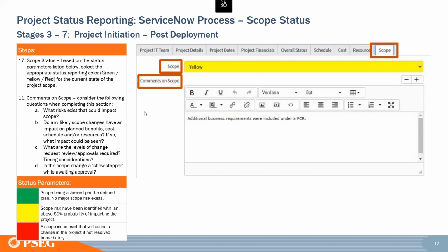And you're going to want to think about what are ways that I can maybe prevent that from becoming an issue. Is potentially a pilot an option, or getting something in front of them so they can visually see what it's going to look like? Or, if they generally can't commit to UAT, how do I identify backups for them and have conversations with the right level of leadership on their side? Or maybe contract resources that I can bring in a little bit earlier to mitigate that. May cost a little bit, but if I can get them up to speed, I can intermingle them with the business side and that kind of thing.